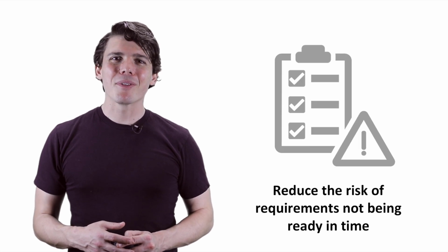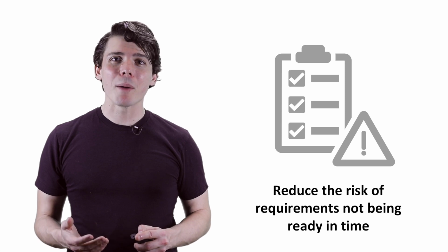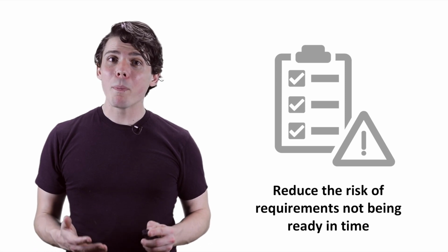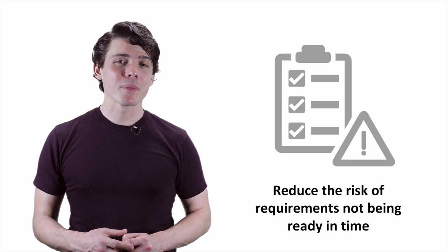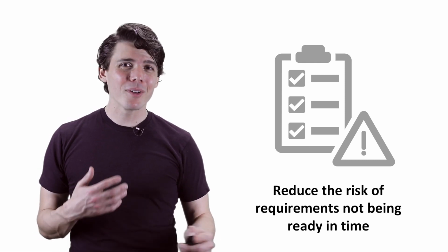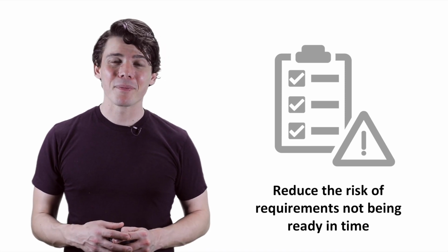The biggest reason for this is to reduce risk. If your team can't clarify an item's requirements during sprint planning, it won't be ready to pull into the sprint and will likely have to wait for the next one. If the product owner attempts to force it into the sprint anyway, the team's sprint forecast won't be very accurate.